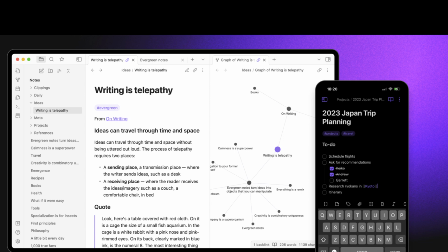Our source also mentions creating sprint planning notes. What is the purpose of those? That's like the master plan for each sprint. A central note where you lay out the overall goals, list all the tasks, set clear deadlines. You could even link those individual task notes we talked about directly into this sprint planning note. It becomes a roadmap for that specific sprint. I like it. Like a mission control center for your sprint. You can see the big picture and all the small moving parts at a glance.